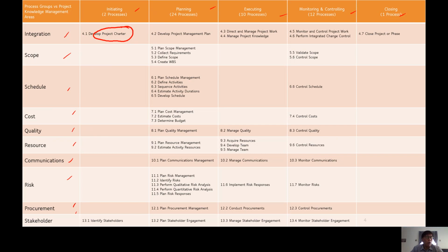So if you're going to do it for the whole of Malaysia, let's suppose 20 million. You mean 100 days for 1 million, so if you have 20 million, there'll be 2,000 days. And 2,000 days will be definitely more than 3 years, maybe about 3 years. And if our timeline or the KKM timeline or the milestone is that we must have it in 1.5 years, for example, for 20 million.